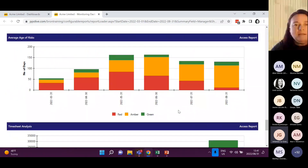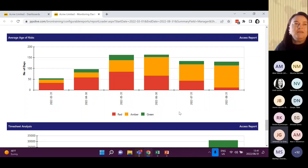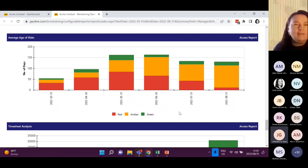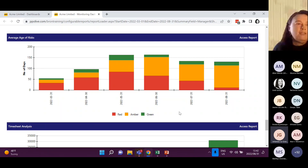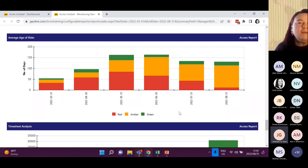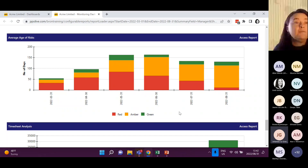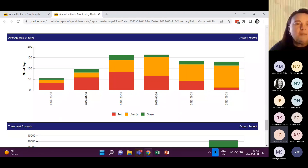Something I was asked recently by a client in the UK was: we've gotten past that stage, we are updating our risks and sticking to the follow-up dates, but what's bothering us now is that we've got some risks that are like 250 days old. By this stage they should be mitigated, accepted, closed off. So can we track the age - the average age - of risks on PPO? What I did was split the graph between our green, amber, and red risks in terms of their risk rating, so we get a clear view of the number of days they've been around. We don't want the red risks sitting around too long.